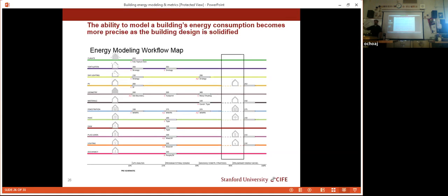I think 48 and 96 was the range, for this building, assuming it doesn't have solar. That number, somewhere between $48,000 or $50,000 and $100,000, is going to get narrowed as my design gets better.